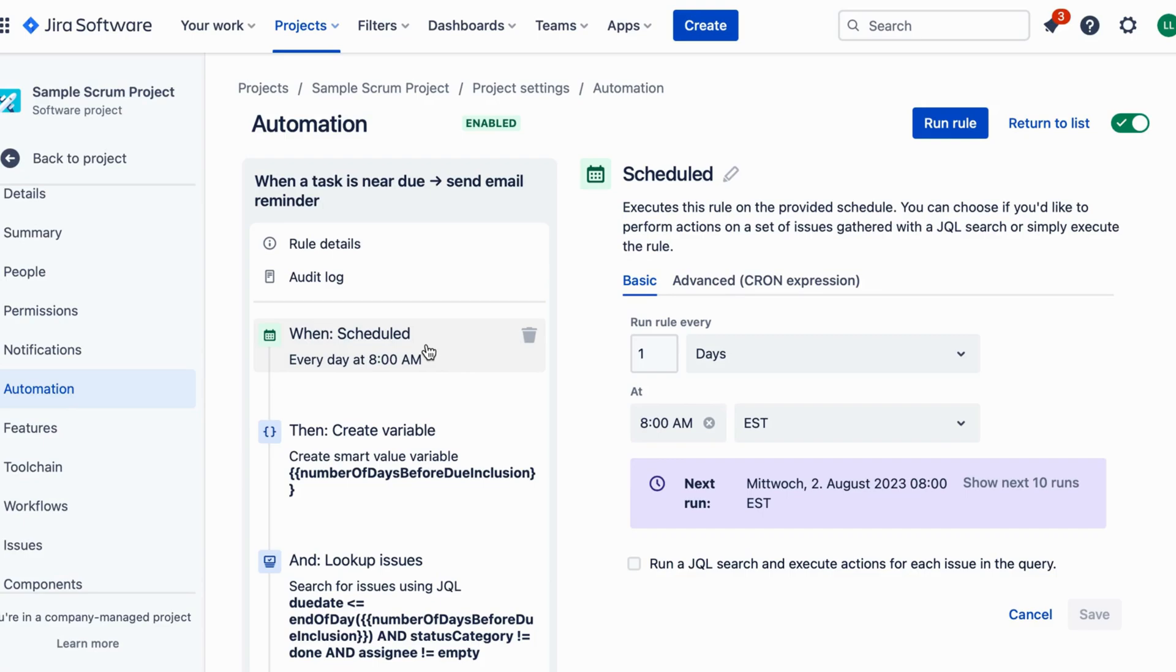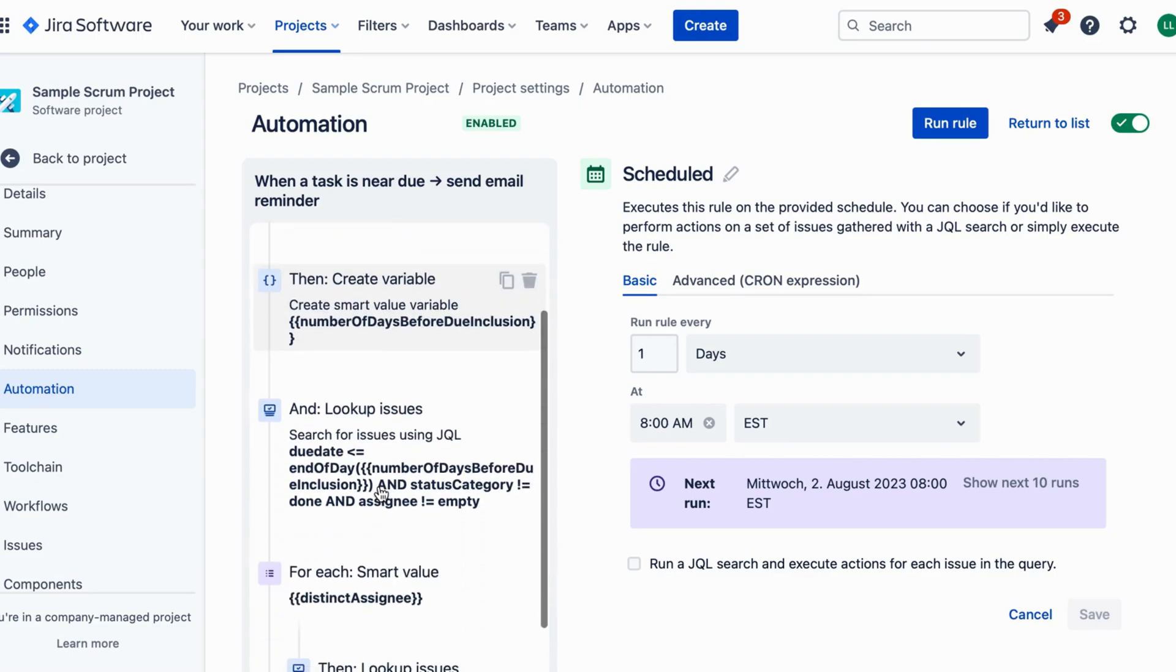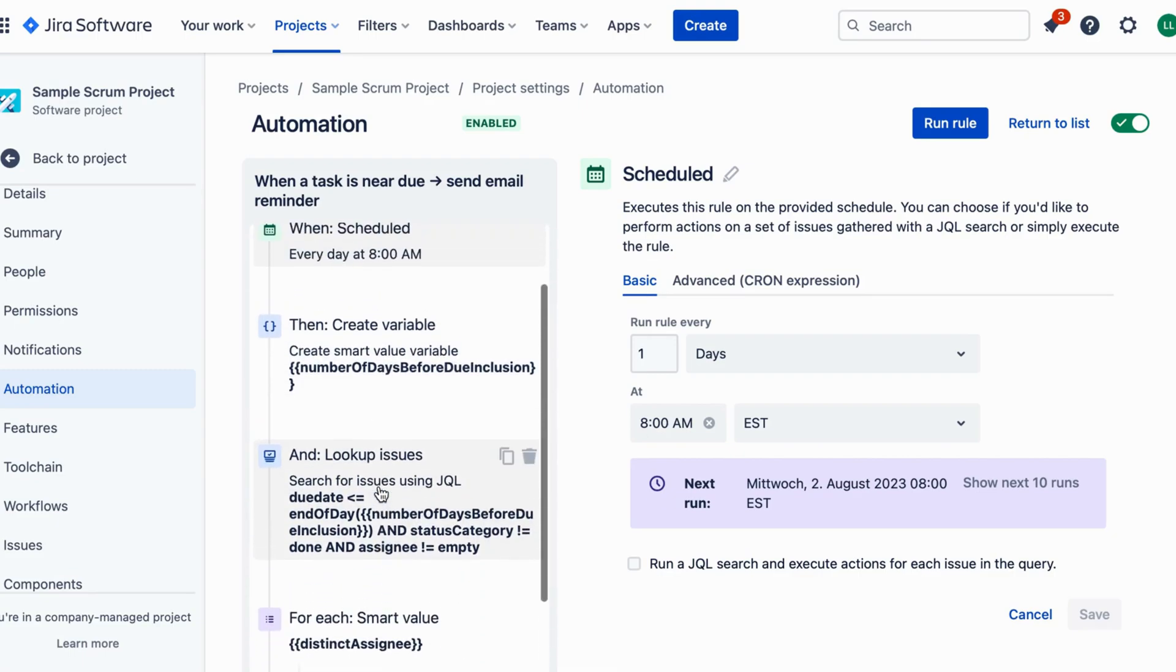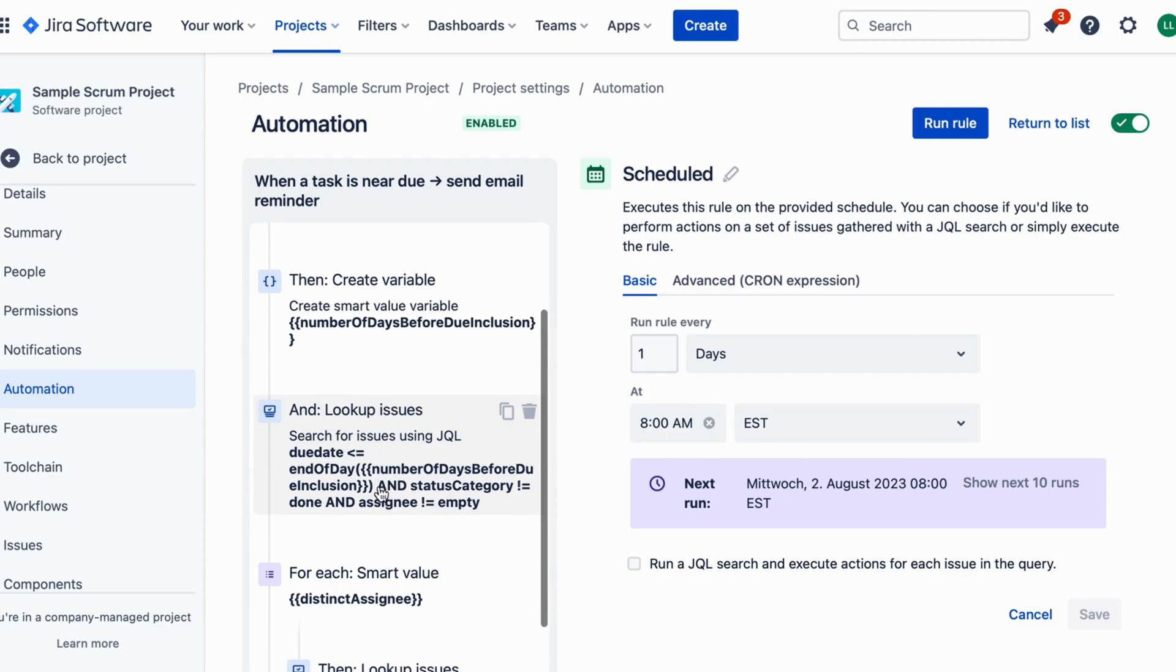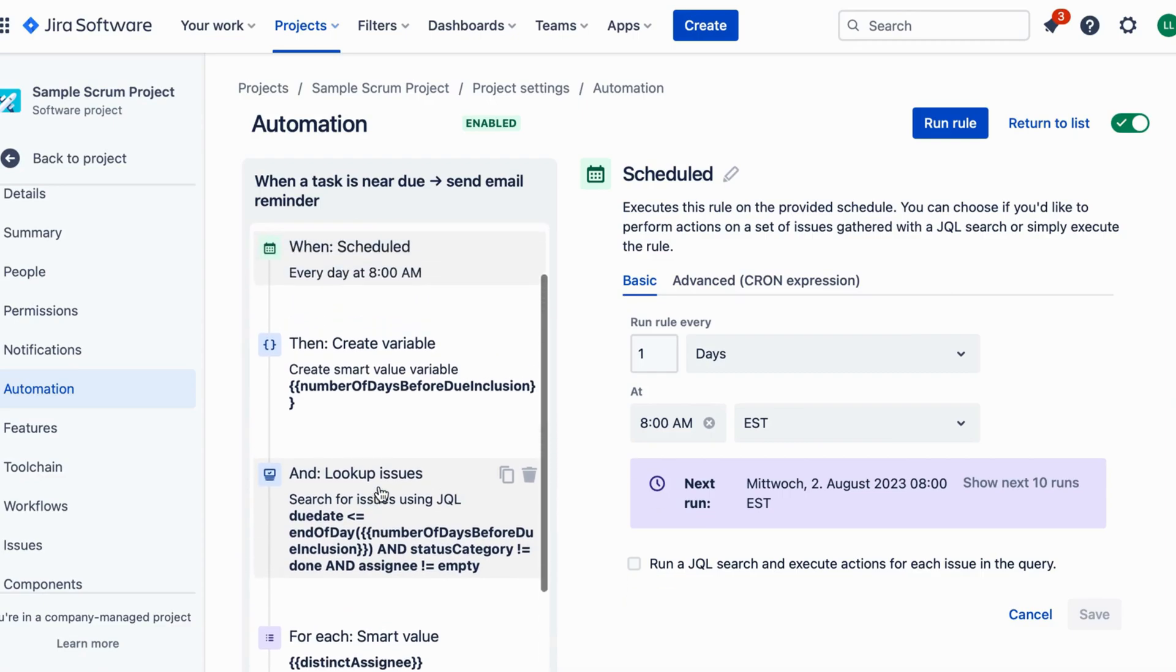Next we need to set the condition for our automation. Click on add condition and choose field value changed from the options. In the second drop-down, select due date to monitor changes to this field.